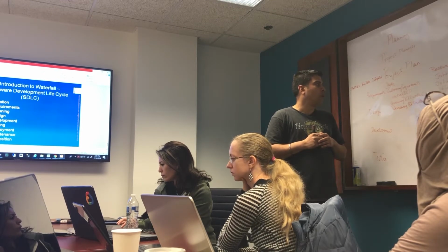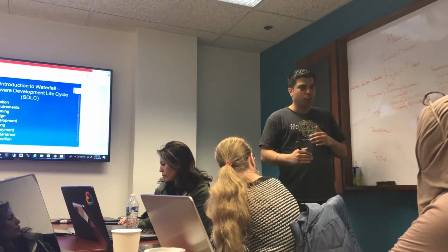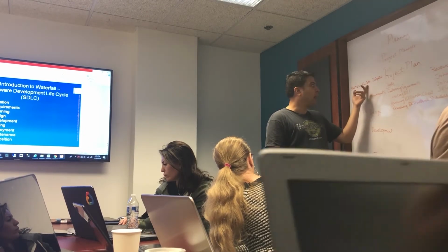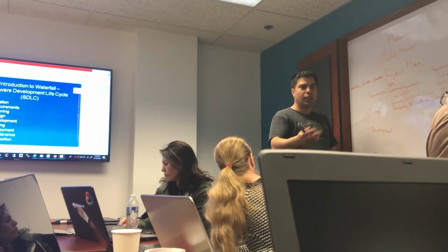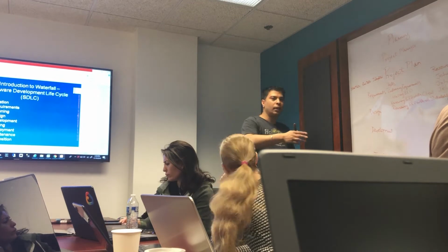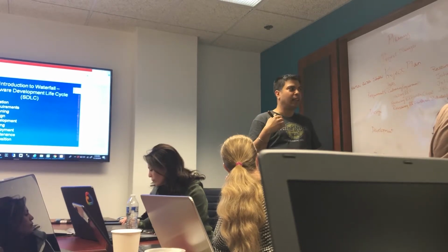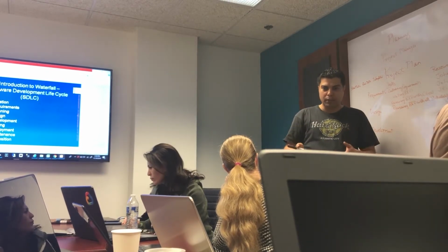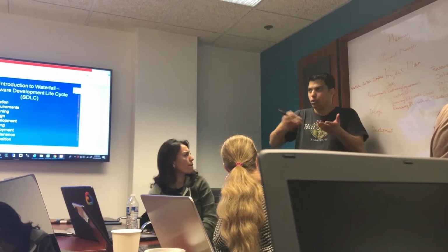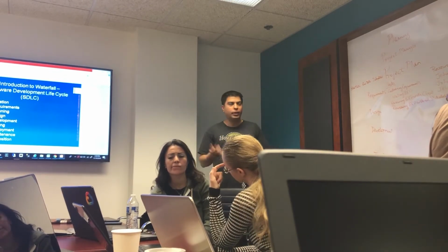Project plan is where all the tasks that need to be done by each team, the name of the person who's doing it, the timeline, and then start date, end date, and while you're doing it, what percentage do you think is completed? So it's a good way for the project manager to keep track on a weekly basis. If you were 25% done, you can't be 5% the next week, right? So the progress, if things are not being estimated, then the project manager goes and talks to the developer manager that your estimates were very wrong. So you need to do something in your team to catch up. That's how the project is run.